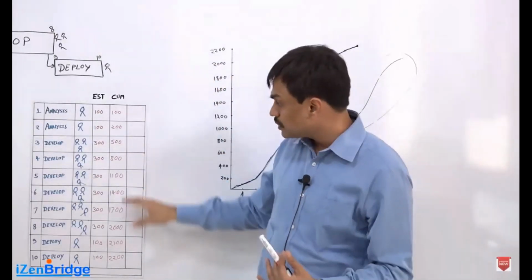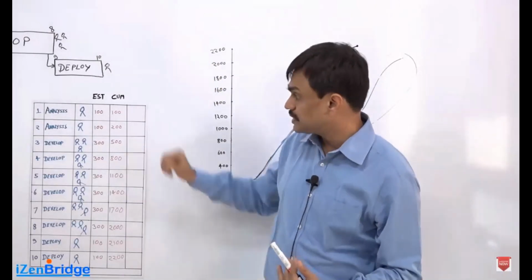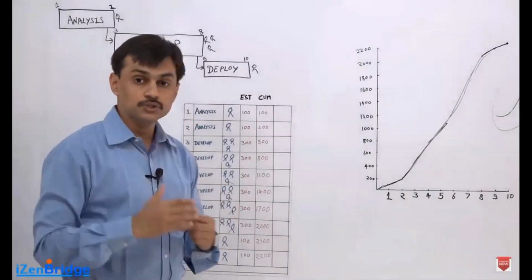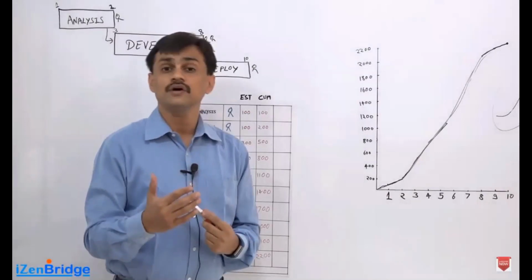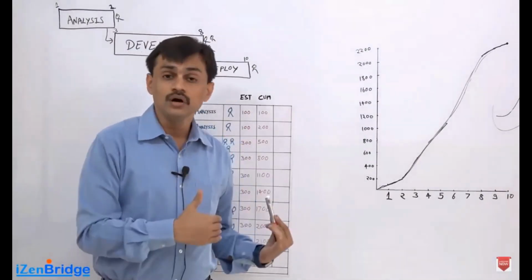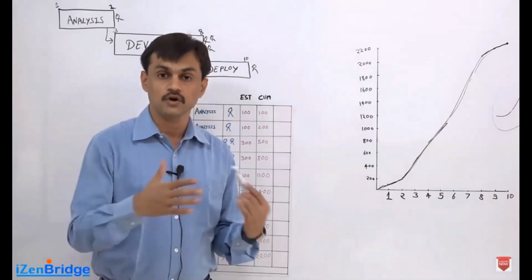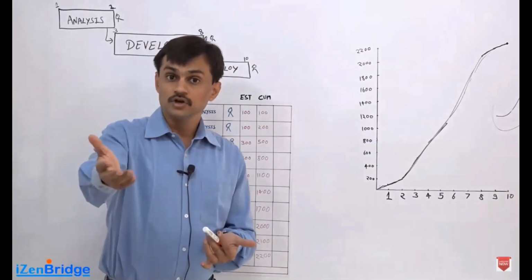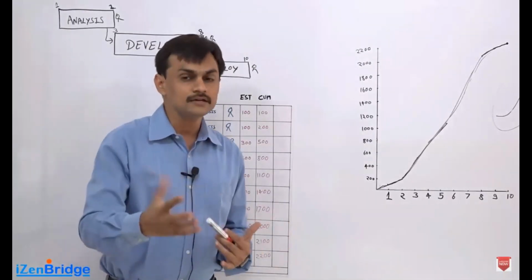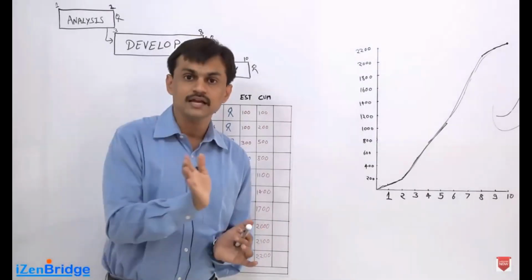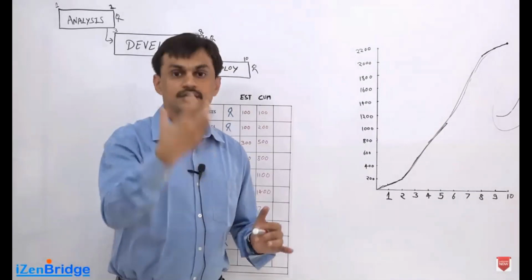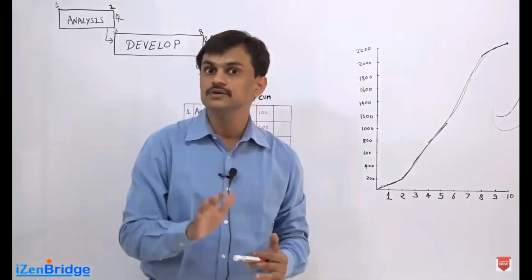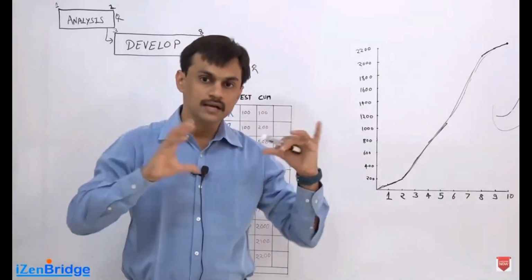Now, how does it look in this particular graph? You may say that, okay, I am in the beginning, and there is no rule for it. It is all about understanding the flexibility of acquiring funds. Many times when I worked as an external contracted project manager with a project team, these were our payment terms with the customers. So funding limit reconciliation was more like a payment term. We get some money on a sign off. We run with that money for a while, and then we request more money on the milestone. We get that money and then we run our project for a while. So it could be linked with your payment milestones when you are working in an external project context.